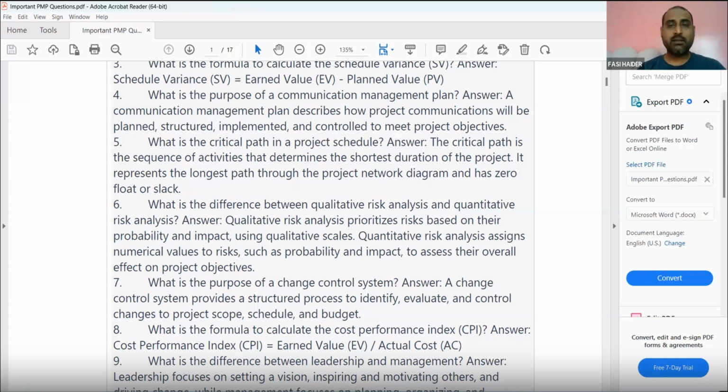Similarly, in project management, the communication is always planned. A weekly report will be given to which person. Will it be given by email or by hard copy? What about the progress report? What about the variation? What about the testing that you are doing? Those things are described and given so that it can be solved easily.